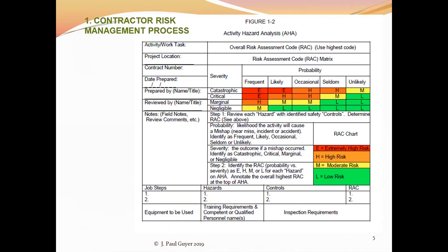And these, to a degree, on the typical project, represent the work of different subcontractors. So site grading is one subcontractor. He's probably also going to do the trenching, setting of the forms, pouring the concrete for the foundations. That's another subcontractor.